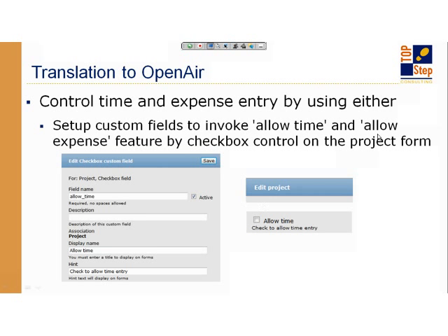And again, I'm talking in terms of the sales methodology, but you could also consider using this type of control for projects. Maybe you have an expense-only project and you don't want people to record time. You can use this type of functionality to prevent the project from being considered for time and have it be expense-only type activity. So now that we have a project stage that's allowing us to track these proposals, and we've got control to make sure that people don't accidentally or realistically have access to put time and expense on it, we've got some controls in place to do that.